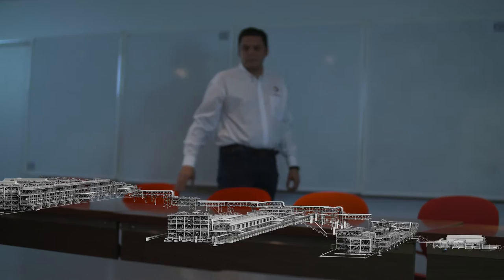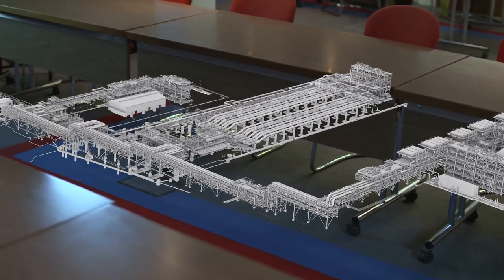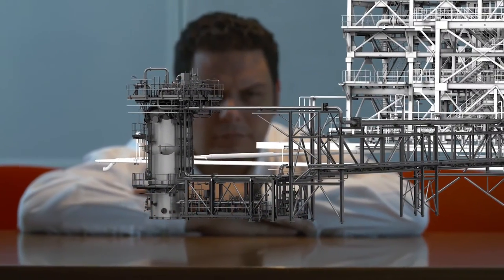The gas and condensate from Edradour-Glenlivet will be processed at the Shetland gas plant, mixing with the existing Lagan-Tormor production stream. However, a new component, mercury, must be removed before export. A dedicated mercury removal unit will be integrated into the SGP, the first brownfield construction activity at the plant.